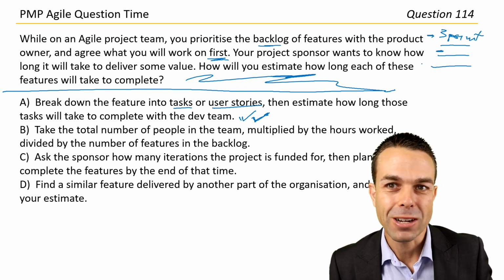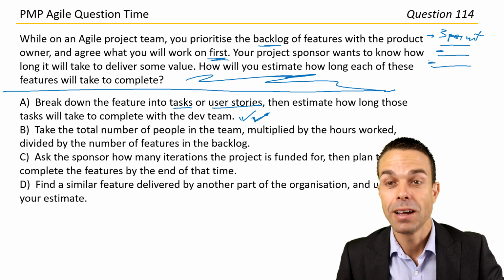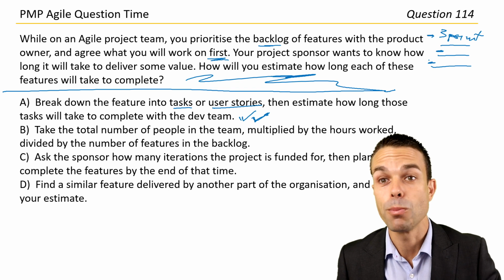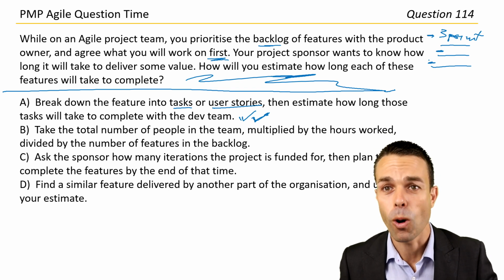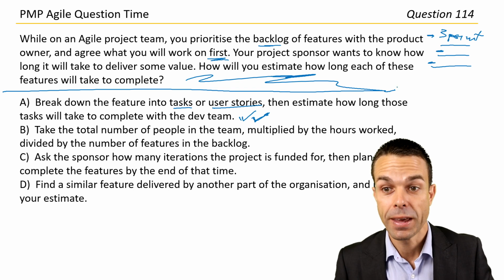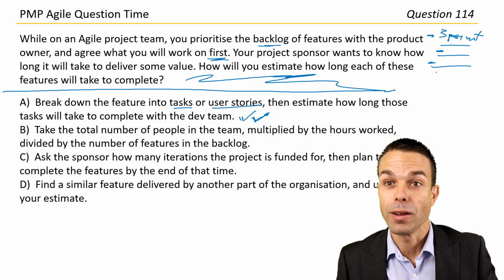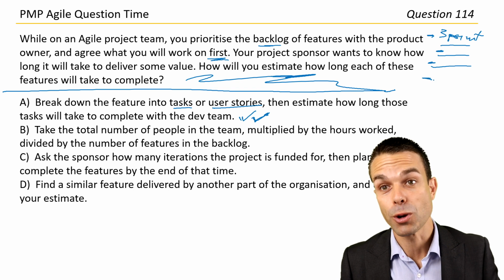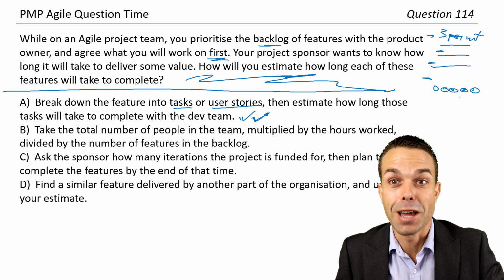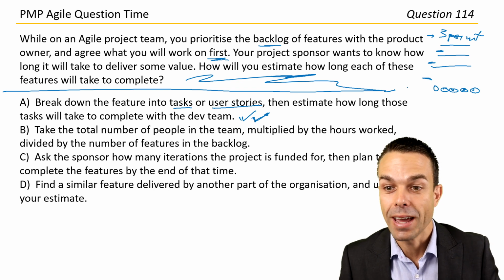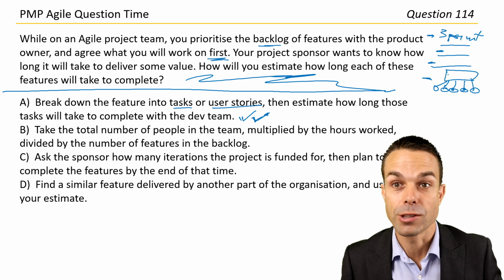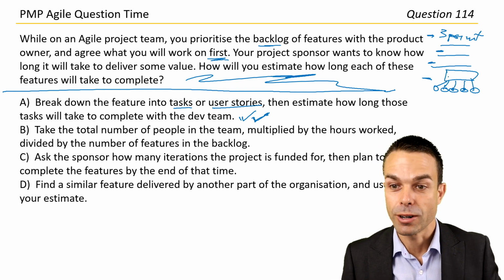Or there's parametric, where we use a parameter. And a parameter is like 3 meters, $3 per meter, or $100 an hour. A parameter per unit of measure, basically. And that's how we estimate. But the last one, of course, is called bottom-up estimating, where we take all of the smallest increments, for example story cards, and we estimate on those individually, and they feed up into, for example, a feature that we're delivering.